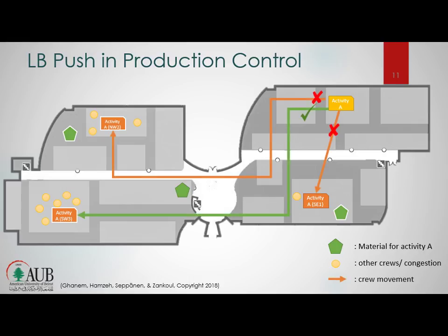If we are following a push technique, and it happened that this activity is on the schedule and it should be executed right now, the crews have to move into this activity, into this location, without considering the other two alternatives, which might help them work more productively, as we can see.